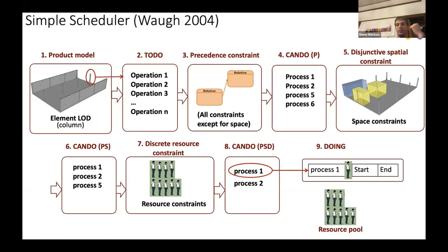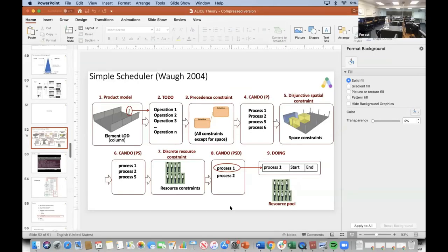And so with Alice, the next time that you run the software, because it runs like 10,000 runs, it flips that order and schedules process two, right? The important thing to remember, you can forget about everything that leads up to that, but just this bottom right piece, which is that when you run Alice once, it schedules process one and assigns a resource to it, and then it resets everything. The next time you run it, it tries scheduling process two. Does that make sense? Yes, it makes sense. Okay. Any questions on your end, Forrest?